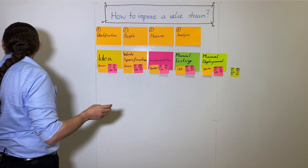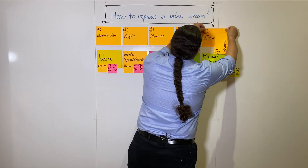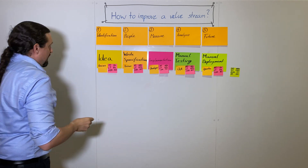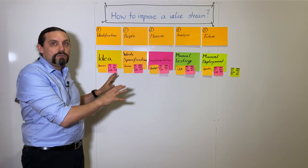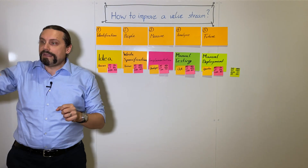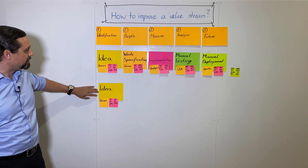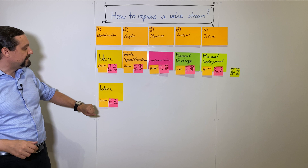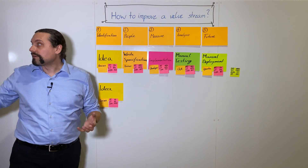When we have done that, we go into the fifth step, which is analyzing the future. In this step we are going to create a new target value stream. In this target value stream we still have the idea step, which is done by the business, but now with a process time of eight hours, lead time of eight hours, and a percentage completed accuracy of 100 percent. This is our target — where we want to be.